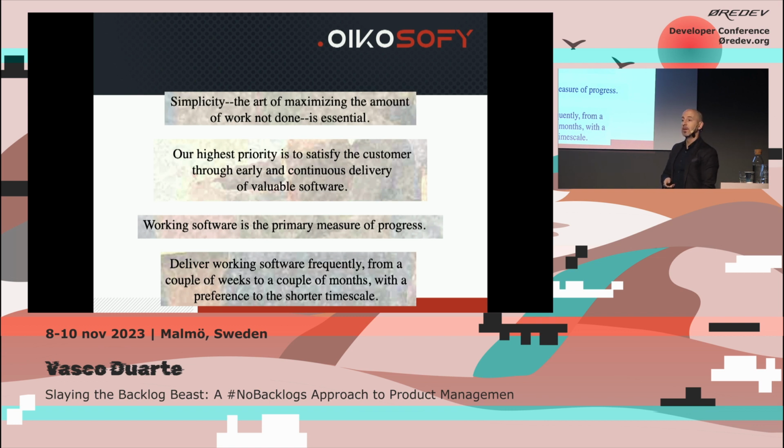In fact, if you were at Marcus's talk yesterday, you heard about the concept of utilization. What does that mean? Why aren't people working on something? Oh yeah, let's get them some stories. Where do the stories come from? From the backlog. Hey, John doesn't have a story to work on. What do? Put another story in the backlog. Guess what? Mary would need John's help, but John is now busy doing a story that wasn't necessary, so Mary needs to wait. But because Mary is waiting, what do?